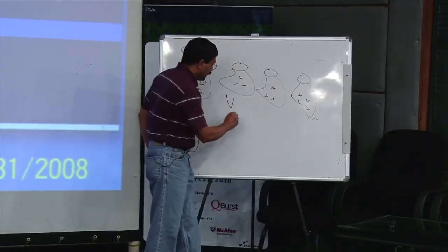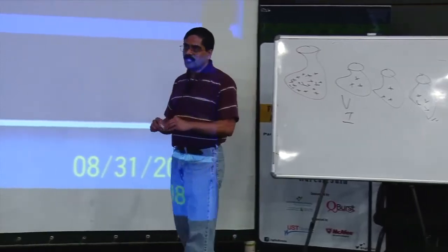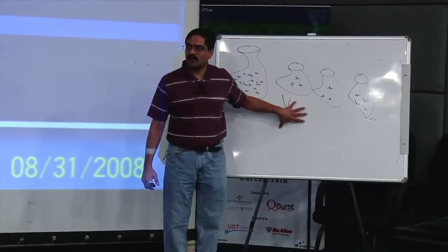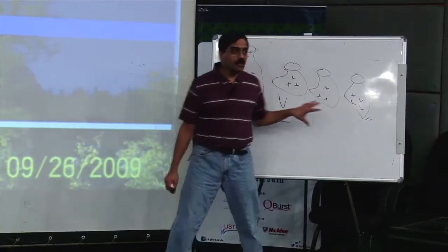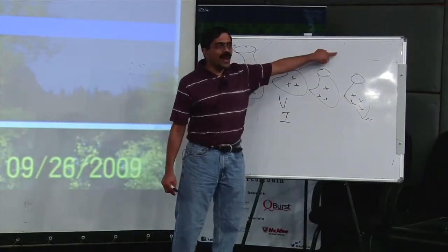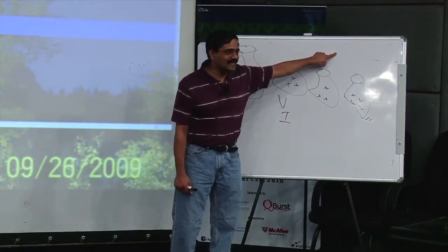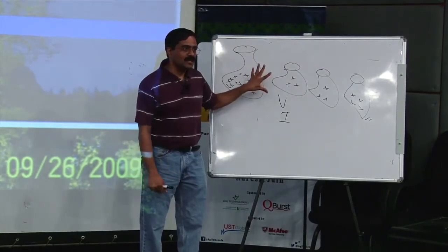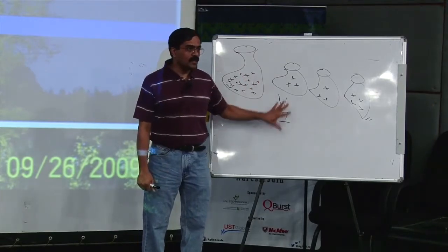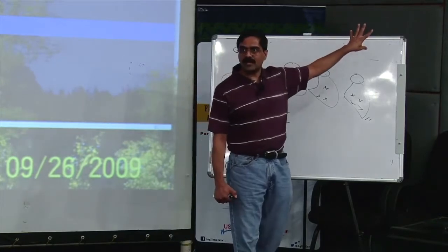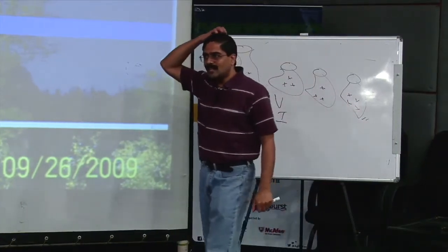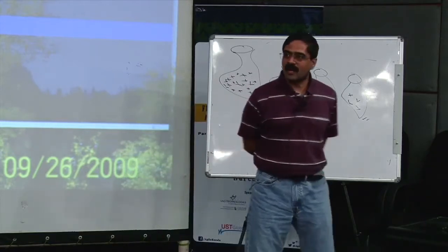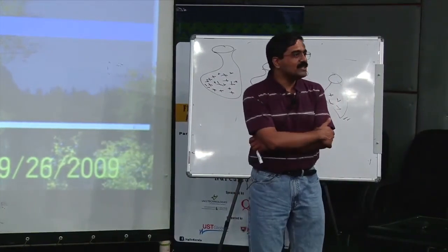The second is the impact. What is the impact of these stories on the architecture? You want to start with the most impactful to the least impactful. If you do this, what happens? The chances of a story coming and attacking you in the end are much less. In fact, I would say it's non-existent if you are given only these stories and if you know about the value and the impact. But it's still possible, however, in reality. How? Because your customer goes out to the market, looks at something else, comes running back to you and says, oh, guess what I found out? I found out our competition is doing this and we totally missed out.